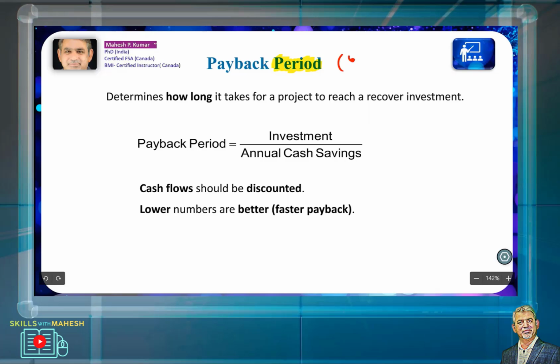So suppose we make some investment in project A, and we make some investment in project B, and we recover the investment in project A in 2 years, and we recover the investment in project B in 3 years. Which one do you think is a better project, just based on one criteria, payback period? Any ideas? A, exactly. Because you are able to recover your investment in just 2 years. Here you have to wait for 3 years.